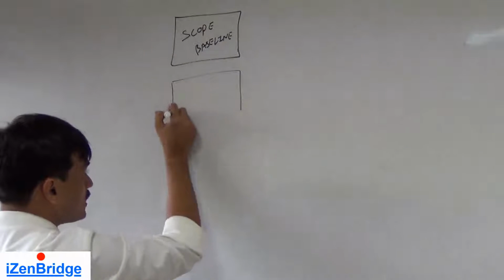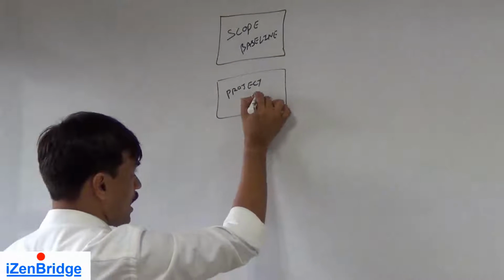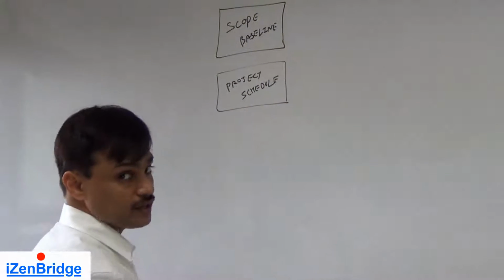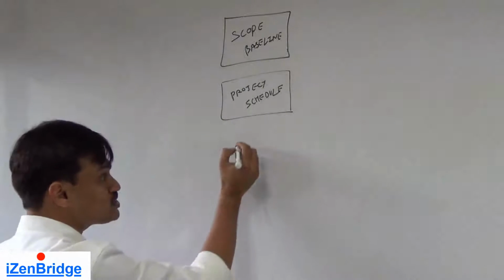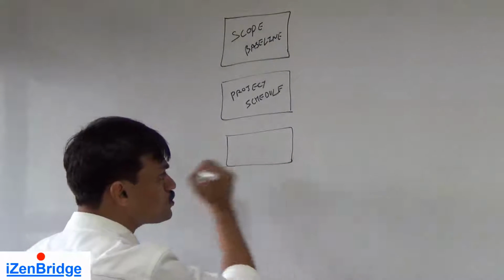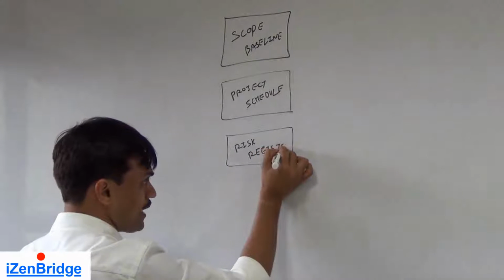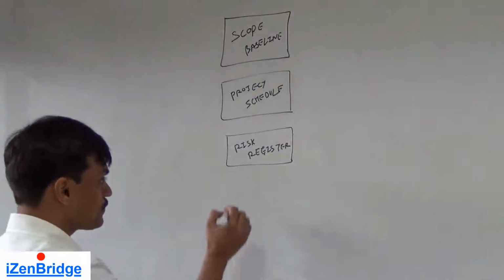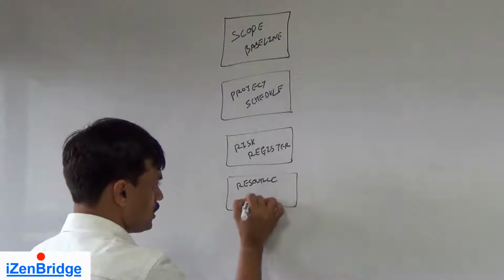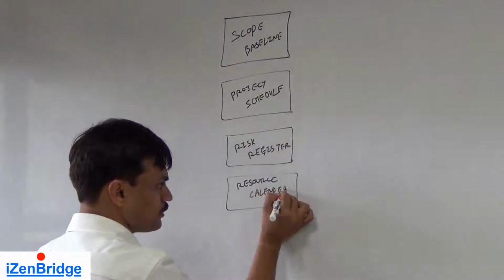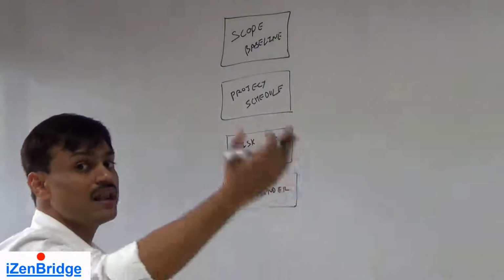We also need to know the schedule. So the project schedule, which we used in our previous process, is still required because while aggregating, we may need an idea of why these kinds of activities are needed and what the sequence of those activities is. So the project schedule is still relevant. We still need to know the risk register. So we need to understand what kind of risks are impacting our cost estimates. We need to know the resource calendar. Now the resource calendar talks about who is allocated for what, and how much duration, to our project. So these were a few inputs, at least these three, which we also used while estimating cost.